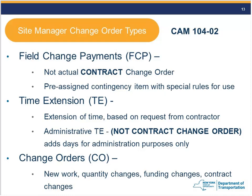Question: after using the FCP item to pay for overruns, does there need to be an official order on contract for reconciliation? The answer is no. The only thing that may be needed is including any unused FCP balance in a cleanup change order. There is no reconciliation at the end otherwise. Also, if the contract finished December 31st and estimates have been run up to that date, an administrative time extension would be needed to allow others to complete their processing.